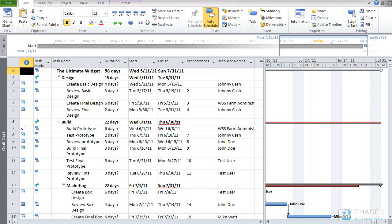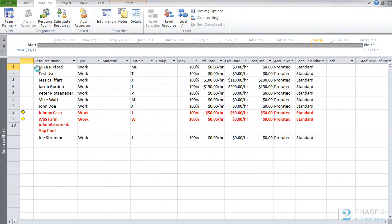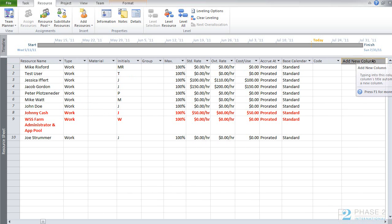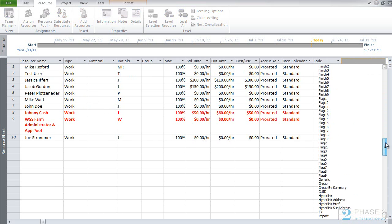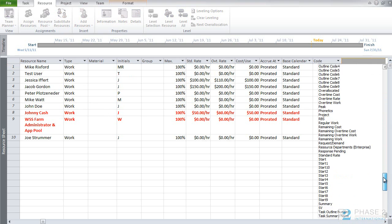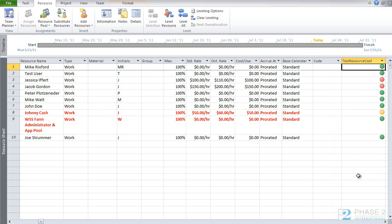And now to use the custom field that we just created, open up Project Professional Client. And go to the resource tab. And then look at the resource sheet. Here, we can add the new field that we just created. And you can see that now there's graphical indicators, giving us a quick view of the cost difference between the different resources.